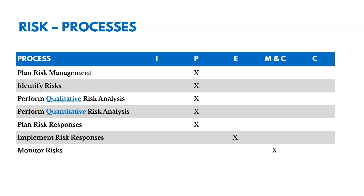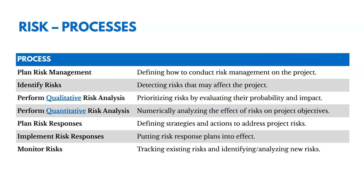There are seven processes in this chapter: five are in planning, one is in executing, and one is in monitoring and controlling. With Plan Risk Management, we're defining how to conduct risk management on the project — who can be involved, what types of tools we're going to use. With Identify Risks, we're detecting risks that may affect the project and putting those on the risk register.